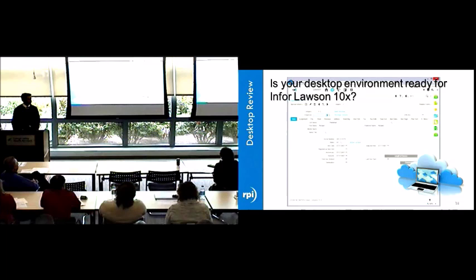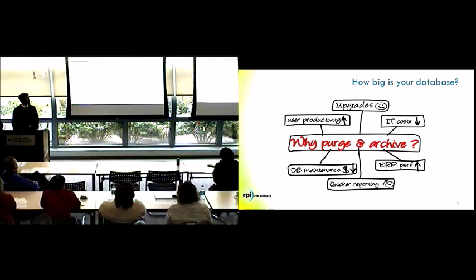Take a look at the size of your database. Of course, when you're moving to the cloud, that entails converting that application database from DB2 or Oracle into SQL Server and uploading the full set of data from your on-premise servers up to the cloud. The amount of time that takes is almost linear based on the number of gigabytes in your database. So take a look at what your application database is,